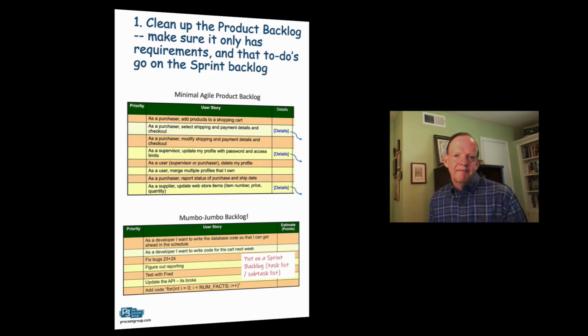So keeping a clear picture of the user stories and the endpoint of the product versus the to-do list of the team. And secondly, there's really no benefit or value I see in formatting a to-do as a user story. That would almost be pretending we had a requirement in the backlog, which we kind of don't. So I would just say the to-do list should be a to-do list, tasks assigned by the team to do their work to achieve the backlog, but the user story should be in the user story format in the product backlog.